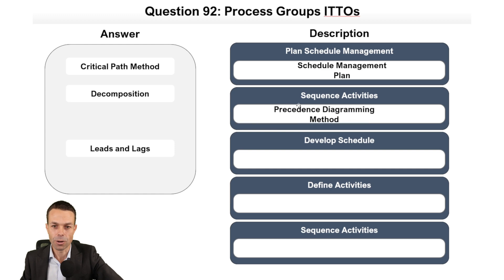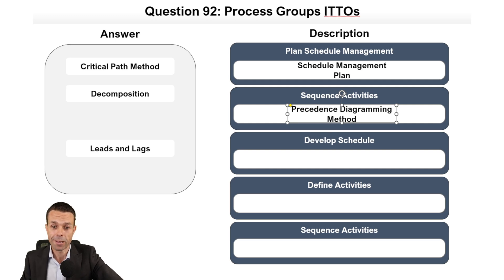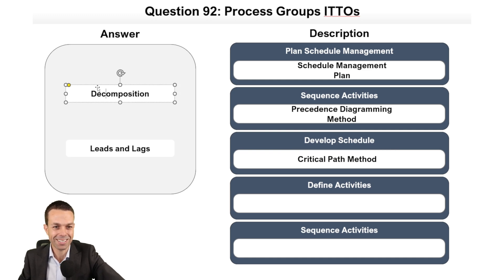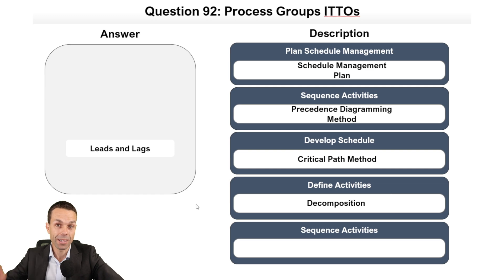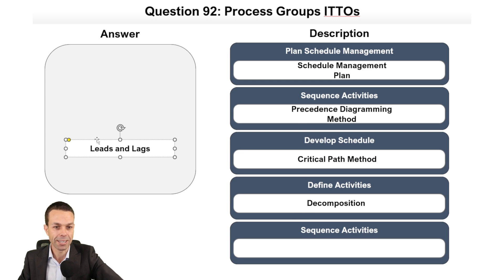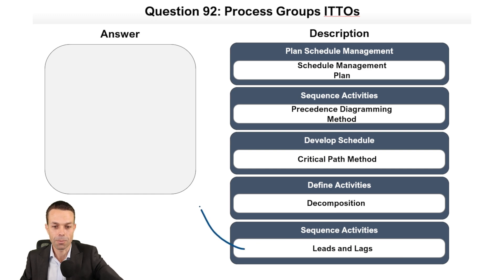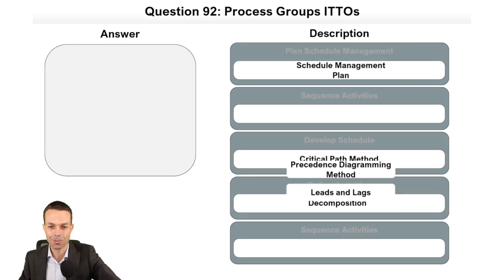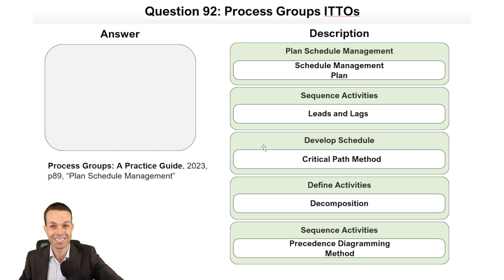For sequencing activities, we use the precedence diagramming method to define what comes first and what comes next. Developing the schedule uses the critical path method. Defining activities uses decomposition — taking our scope and breaking it into individual activities. Notably, both leads and lags and the precedence diagramming method are used for sequence activities. That's verified on page 89 under plan schedule management.